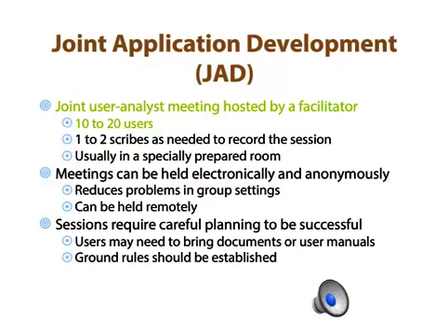Rather than conducting one-on-one interviews, which can take a long time, sometimes we get a bunch of users that do similar functions, and we put them in a room together, and we call it a joint application development or a JAD session. It's facilitated probably by an analyst, and we conduct this JAD session where people are going back and forth and having a conversation.